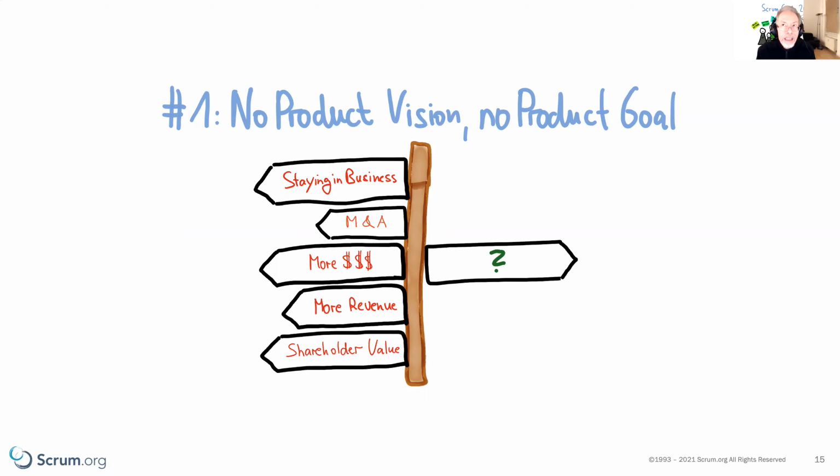That's a good question. I think, again, we have our typical Gaussian distribution here. I like small stories. If you can cut stories as small as possible, you will probably need a few minutes on those, 10, 15, 20 minutes. The larger the story, the more refinement you need, because there are so many hidden issues that you need to talk about. So do yourself a favor, make items as small as feasible, given your context.